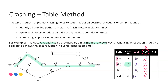The longest path is your critical path, so the greatest time is now the new critical path. By reducing A by two units, I've actually only saved one unit compared to the original. So A would allow me to save one unit.